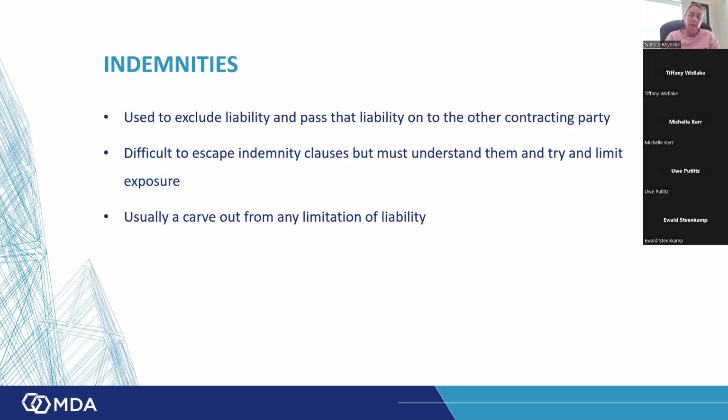There's an indemnity that the employer gives to the contractor for loss or damage to an existing structure and the content of that structure. That indemnity means that even if the contractor causes that loss, obviously the works has got to be for some kind of adjustment to the existing structure, if the contractor does cause a loss to the existing structure, the employer has said, I'm indemnifying you, so I'm going to step into your shoes and take responsibility for that loss.